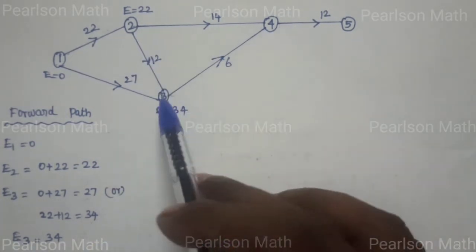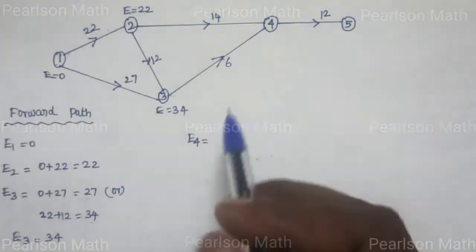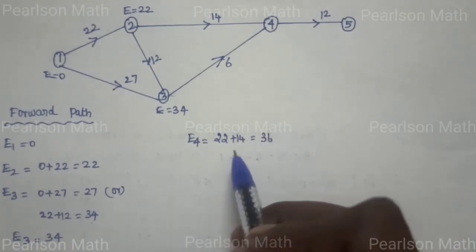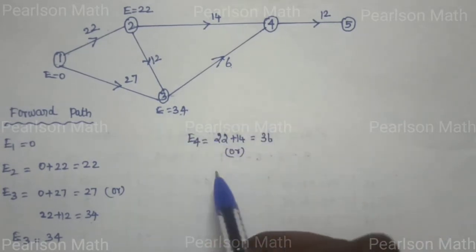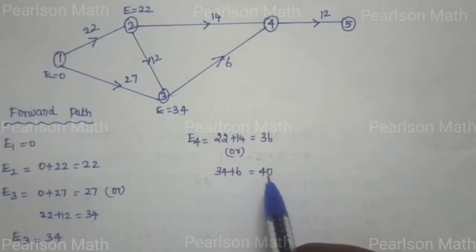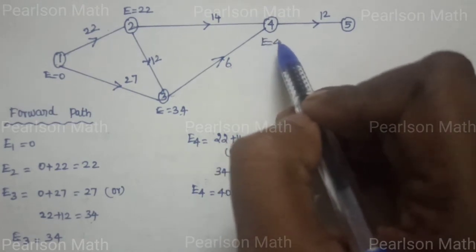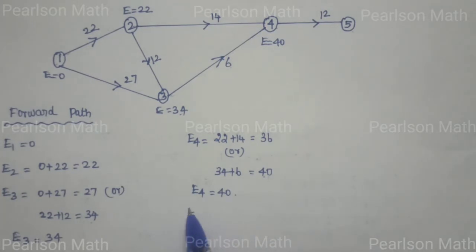Next is node 4. For 2 to 4 and 3 to 4, two possibilities: 2 to 4 is 22 plus 14 equals 36, or 3 to 4 is 34 plus 6 equals 40. E4 equals 40, the maximum number. E5 equals 40 plus 12 equals 52.